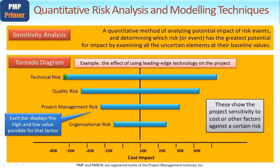You'd want to arrange them with the most severe cost sensitivity at the top, hence giving it this very approximate tornado shape — hence the name tornado diagram. At one extreme, using leading edge technology could reduce costs from a technical perspective by minus $30,000 to $40,000, or it could increase costs by $40,000 or thereabouts. So considering costs as the metric, we can see which risks have the biggest impact — whether the risk is a threat increasing costs, or an opportunity reducing the cost of the project. The example uses costs, but it may be some other aspect you'd want to compare categorized risks against.